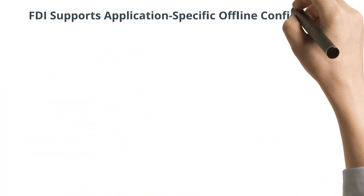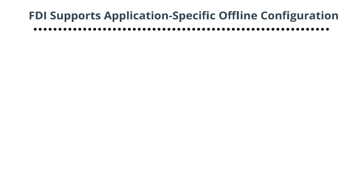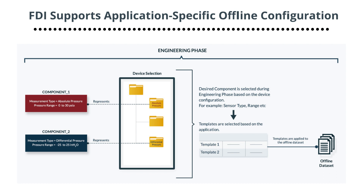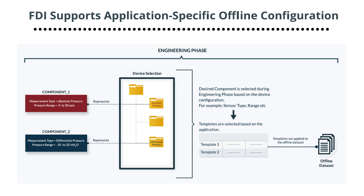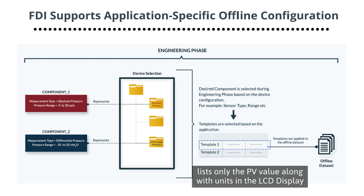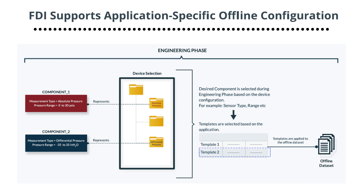Let's dive into the details of how FDI provides benefits with its offline configuration features. During the engineering phase, FDI has implemented standardized templates — sets of device settings recommended by the device supplier to implement a specific instrument application. For example, an LCD display of a transmitter may have two templates. Template 1 lists only the PV value along with units in the LCD display, whereas Template 2 includes values for the parameters that allow the LCD display to show the PV, SV, TV, and QV values at a frequency of 1 second. Having templates predefined in an offline dataset during the engineering phase leads to improved efficiency during the commissioning phase.